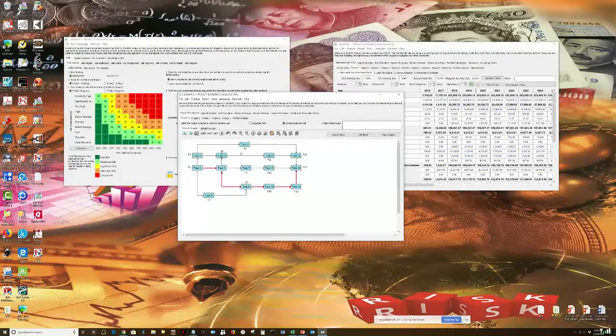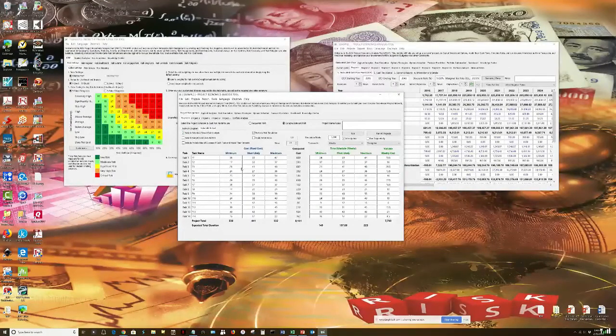So think of it now as a systems dynamic type of situation where things break up in parallel. 6 begets 9, and 5 goes to 11. But 9 also goes to 11, and 11 goes and joins back into task number 14 in this case. So you can draw this, and I'll show you how to draw that in a minute. And you can go into schedule and cost analysis, and I can put in fixed costs, scheduling in weeks, variable costs in weeks. I can have minimum, most likely, and maximum values for costs, for fixed costs, for scheduling.